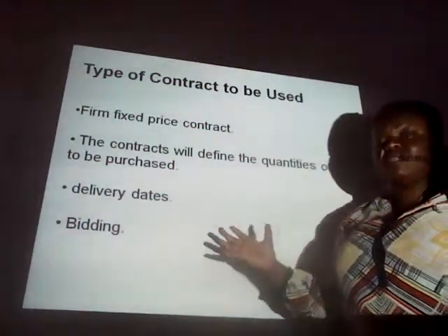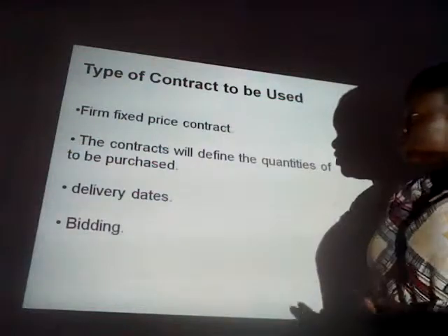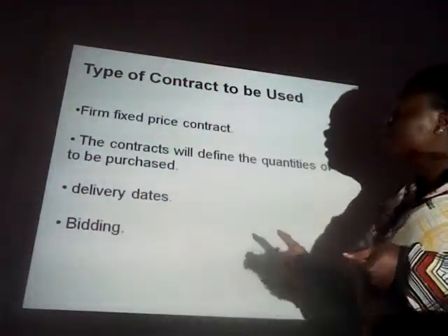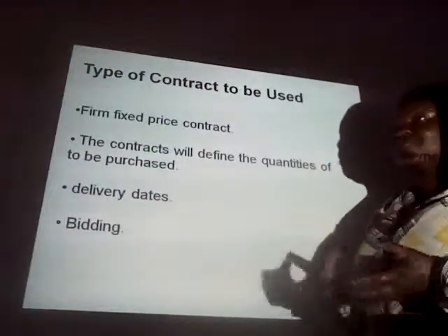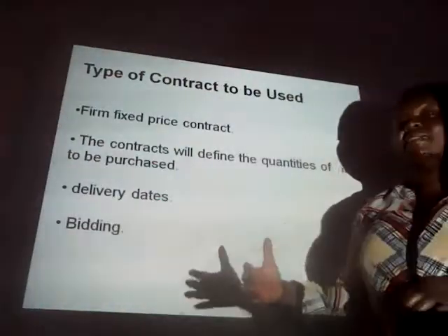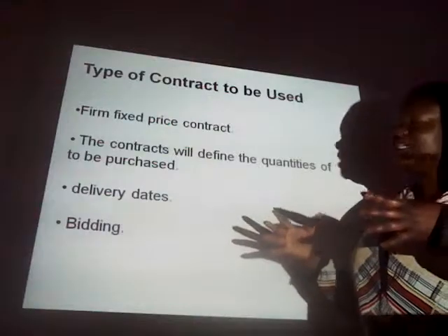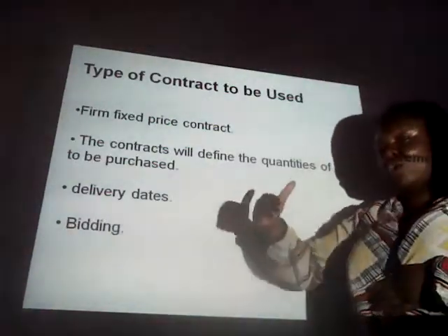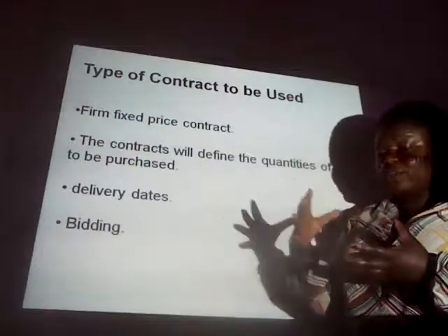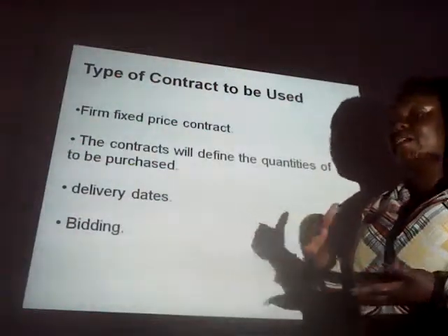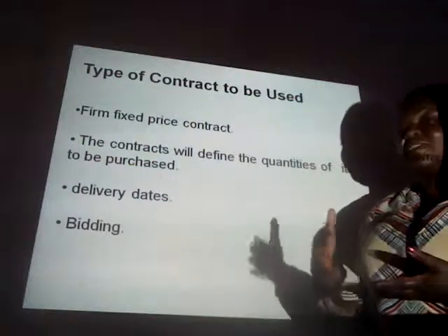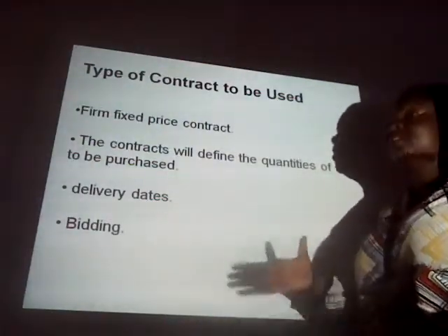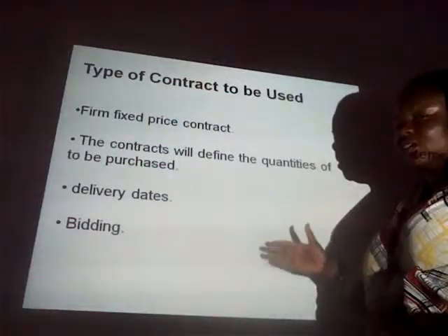The Project Management Body of Knowledge defines this contract as a contract where a fixed amount of money is agreed between the buyer and the supplier, during which, for the agreed duration of the contract, any price increase will be incurred by the supplier, and any price reduction will be at the loss of the buyer.